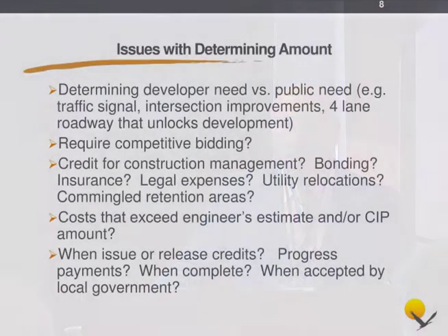There's lots of other issues that can arise. If they have a construction manager, do you give them credit for those costs? If they have to bond the project, do you give credit for those costs? If there's insurance, legal expenses, utility relocations, if they're commingling the ponds, these are all issues that can arise in a credit scenario. I can tell you that at least in Pasco, we do give credit for construction management, but we cap the amount. We give credit for bonding insurance, but we cap the amount.